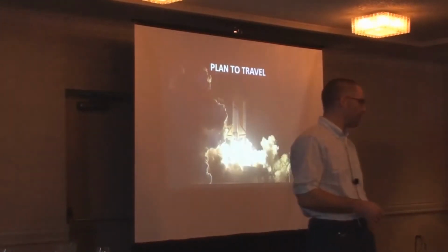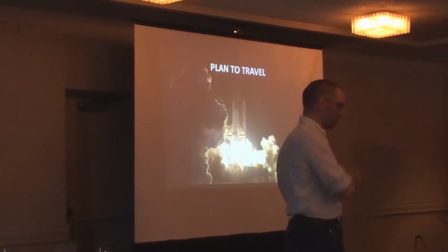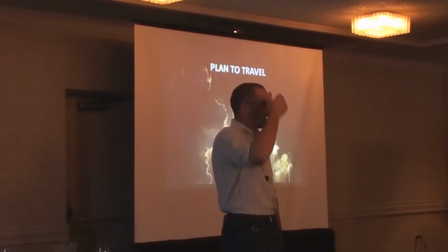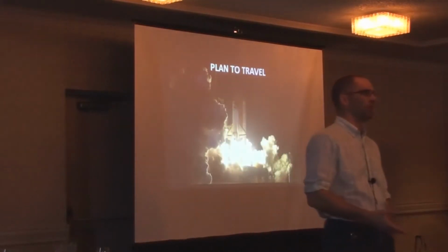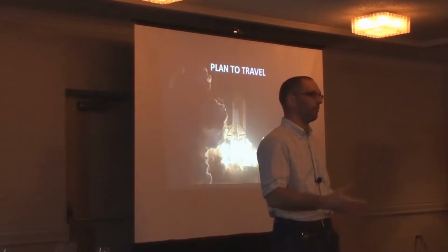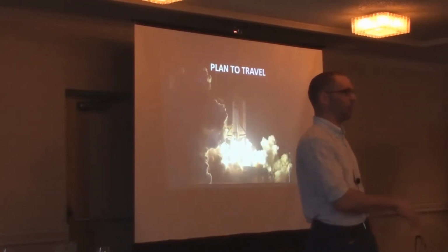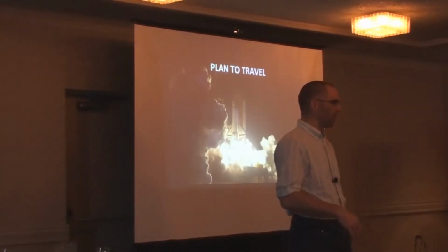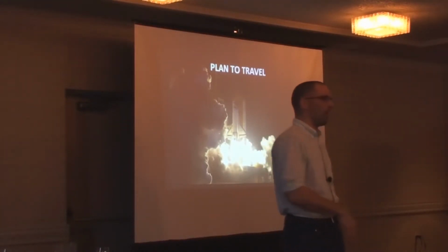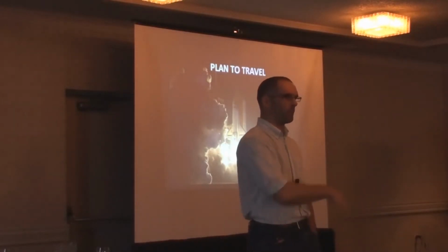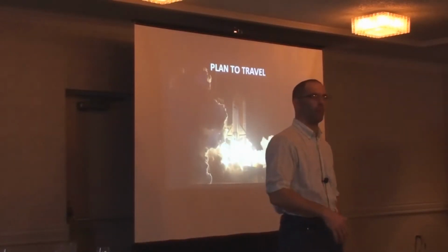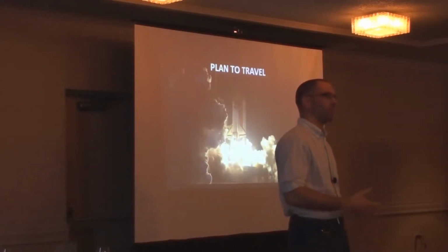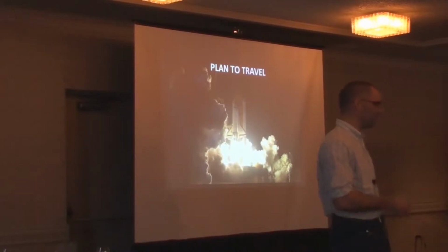Which comes to planning to travel. Not quite like this. That looks fun, but it's a little costly. So we typically have people travel at pivotal points during the project. I like to get all the developers into town at the beginning of the project, get everybody in the room, and get a shared vision for what we're going to be doing. Not upfront design, but the general concepts that we're thinking about, and sketch out the overall architecture, just because it makes those telephone conversations when everyone's at home a lot easier to get through.